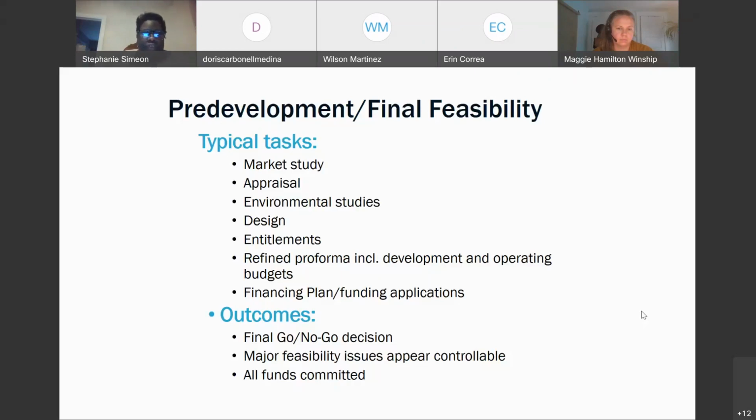It's called something for your environmental justice. So you're going to want to make sure that you do that. That is not on the environmental consultant. That's going to be on you as a developer to disclose that. That's the right thing to do, to disclose that to the community, and then say, because of that, that added another $1 million cost to the project. Therefore, we're scaling it back this way to keep it within budget. So those are the opportunities you want to take. You want to make sure that you're being transparent with the community.